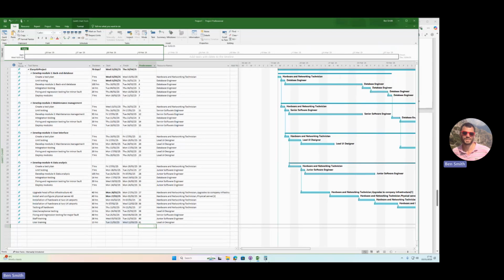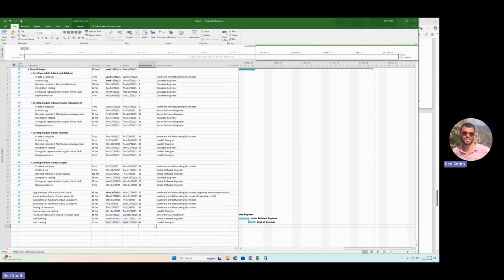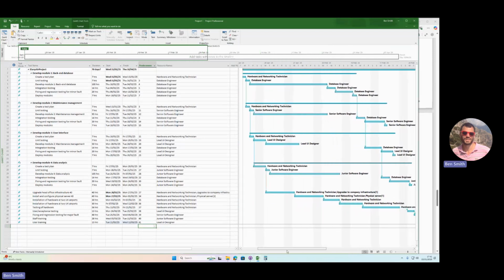We seem to fit everything well within the end of the project. I finished by the middle of March. Now, you could say in your rationale that that means that we've got contingency time built in, that if there were unforeseen things that delayed it, then that's something you could say.